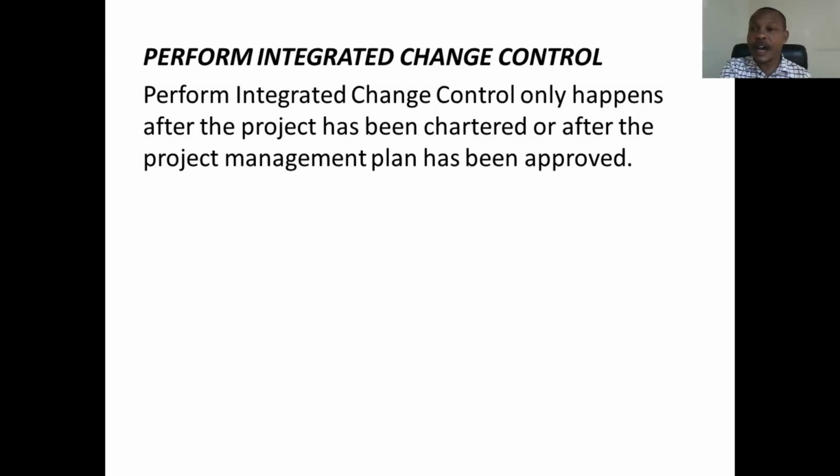So now you're going to look at how it's going to affect the cost, the scope, the schedule. If you add an extra 10 meters, it's going to affect your plan. If you were supposed to execute the project in 1 month, maybe you have to add an extra 5 days. That is an integration. You're integrating it. And also the quality, how it's going to affect the quality requirement. Then material resources, that means you need more material.